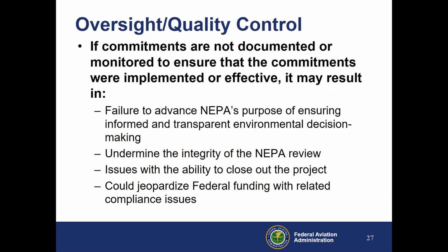If we don't commit to those commitments in the document, or if we don't monitor to ensure that those commitments are implemented, it may result in the failure to advance NEPA's purpose for ensuring that we have an informed and transparent decision-making process. It also undermines the integrity of the NEPA review, and it causes issues with the ability to close out the project, which then could jeopardize federal funding with related compliance issues.